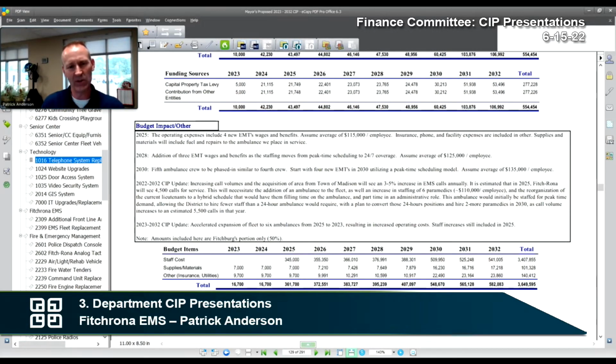As far as EMS or ambulances work, we get queued up. So we spec it all out and say, this is what I want, and we enter the queue. Building the ambulances themselves is not the huge issue. It's actually getting those chassis. We use Ford chassis, so that's the holdup on our part.